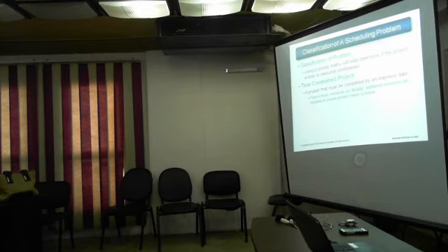Time is fixed, resources are flexible, additional resources are required to ensure the project meets schedule. Or a resource constraint project, which is a project in which the level of resources available cannot be exceeded. Resources are fixed, time is flexible. We cannot have both. It's impossible. Inadequate resources will delay this project. So at the end of the day, either bring in more resources, which is extra cost, or stick to your resources and extend the time. It's one of the two cases.